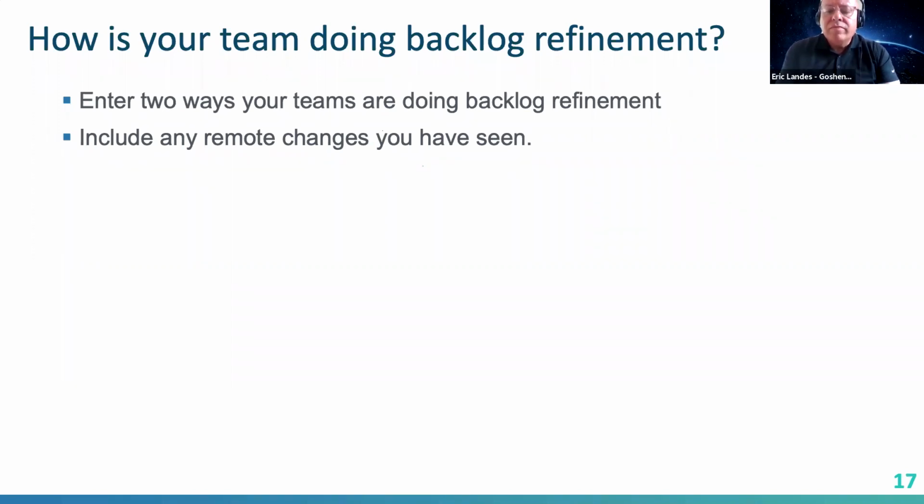Yep. So I actually work with Mike, and for our team, we try to have grooming the week before, and during that, I will have the stories built as well as any wireframes and AC. We do grooming and estimation at that time. And then when we pull the items in the sprint, if we're working it there or during TCC and we need to refine or break apart stories more, we do it at that time. Cool. Yep.